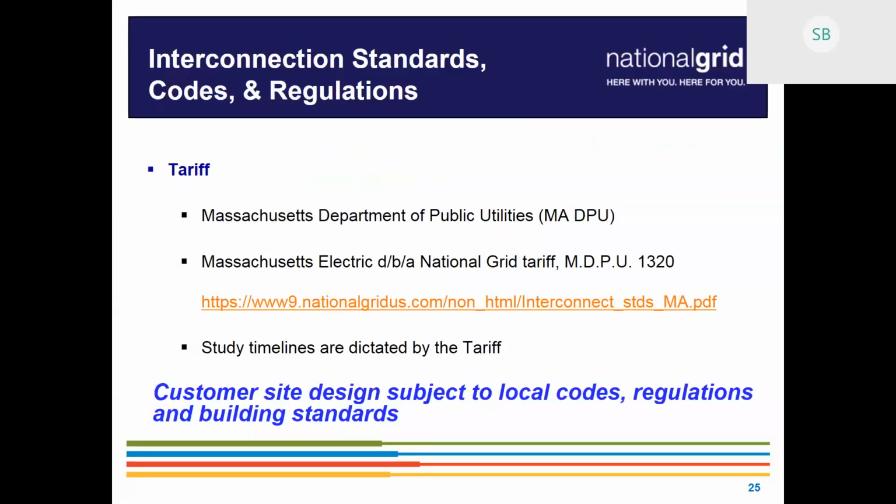So we would have the study done and complete at around day 50 or so, 52, and we would send it out to you with what the customer side document revisions are, and have those cleaned up before we issue the final report, which then leads into issuing the ISA. That way, you don't end up in a situation where you go to ISA, move into construction, and we're still trying to figure out some things on your plans. It's there to help our process and to help you have everything move smoother.